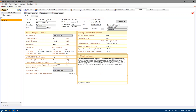Now, if these values come in under the allowance permitted per metre squared, the clients aren't issued a credit — it's just effectively that they're not charged any additional. So if you're doing a design and sell service and clients are trying to provide the most value for money and they've got a really big house, they're going to be entitled to a really long kitchen. Giving them that extra long kitchen, as long as it stays within the parameters, will be to your benefit.